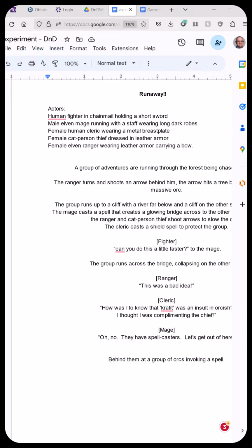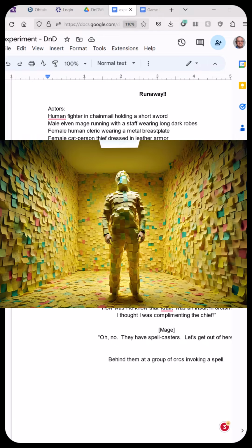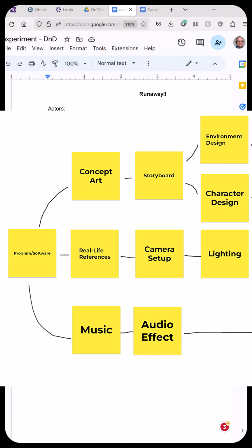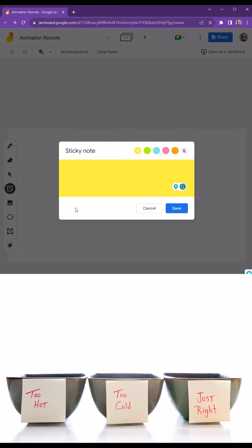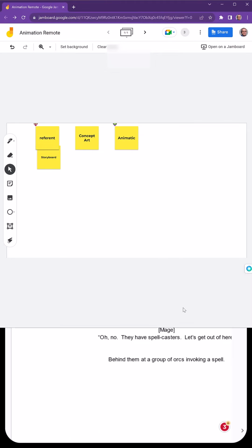If you make your tasks too big, it becomes unwieldy. If they're too small, they're also unwieldy. So for creating our basic task list, we want to keep that size just right. So you might list that you need to create assets, that you need to create characters, you need to create the environment. Those might be separate topics.